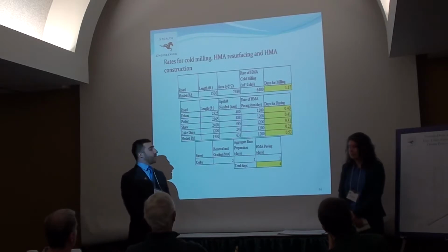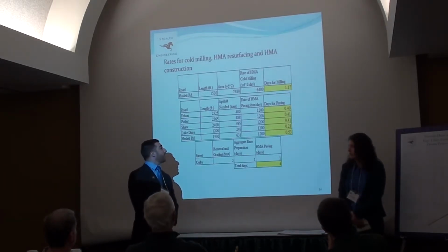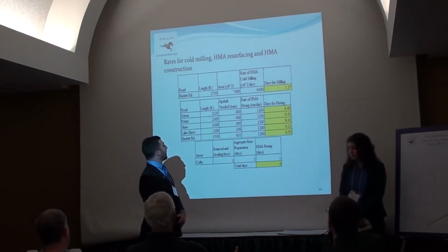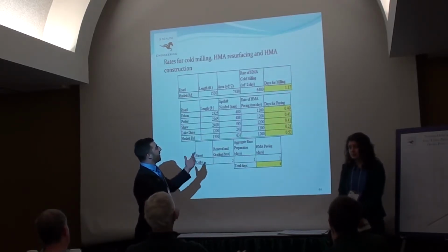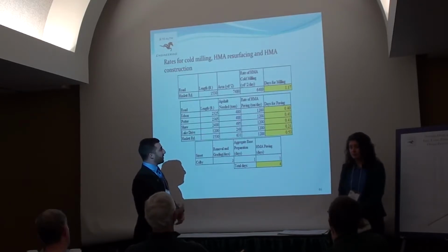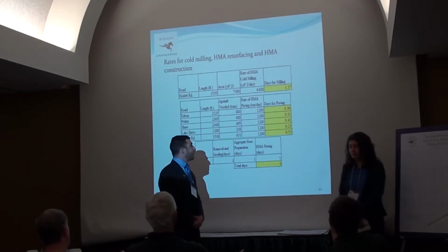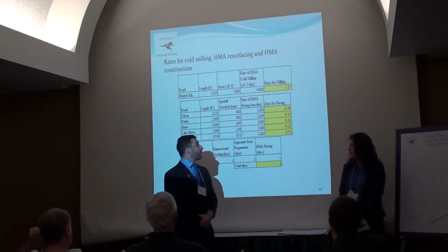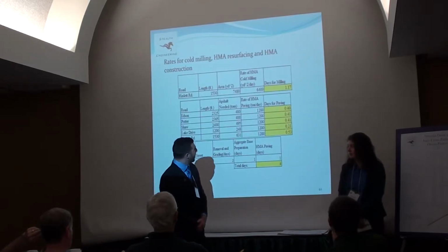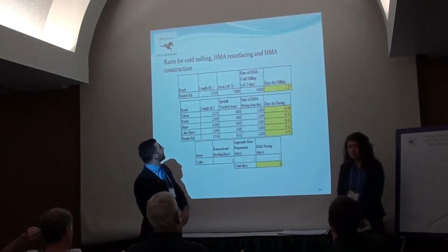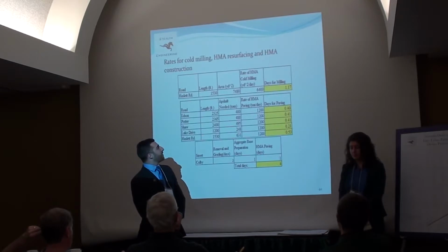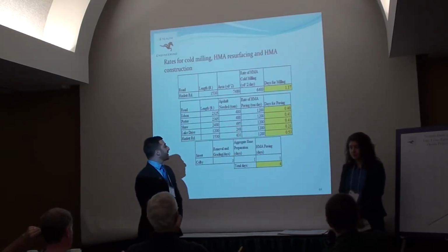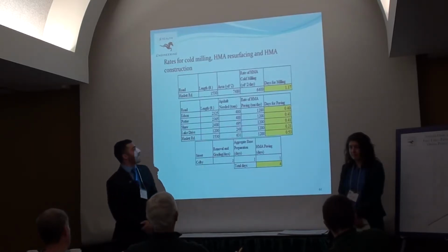Tying back into our decision to close roads down during paving for local streets, using total length, asphalt needed, and our rate of paving, which was obtained from the Michigan Roadway Design Manual, you see that days needed for paving for link roads is significantly below 1 day. In the case of Hazlet Road, we see that using our rate of HMA coal milling, it would be approximately 1 day for milling, and down here approximately half a day for paving.